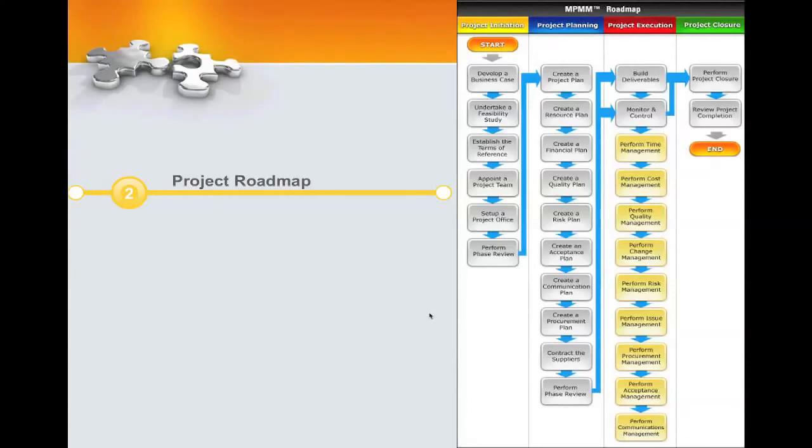So if you take that to the change control board, everyone agrees, and the project plan, the schedule, the timeline, the budget all get re-baselined because everyone's now agreed. Yes, something did change, but now you've all agreed to change the timeline, or you've agreed to change the budget.